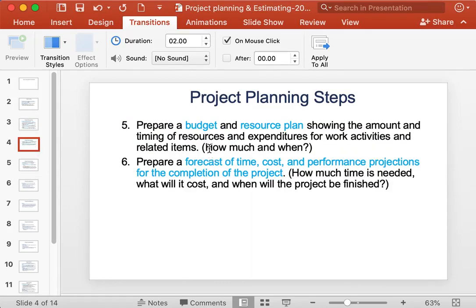Once scheduling is done, we can prepare a budget and resource plan showing the amount and timing of resources and expenditures for work activities and related items. Through this we can answer questions like how much and when resources need to be ready and when expenditures will be incurred.